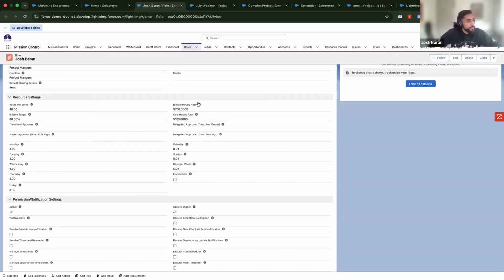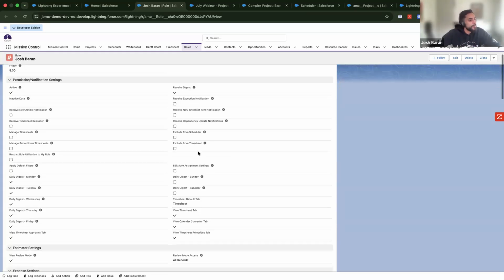The other bits that I house as well is a billable rate and a cost rate. So when I put Josh on a particular project and I'm charging my customer, I charge them $250 an hour for Josh's time, but I pay Josh $100, right? So when I'm thinking of a project, Josh is reflecting, I've done 10 hours against this particular task. It's going to accumulate costs, which is going to give you really good visibility, especially profit-wise as well.